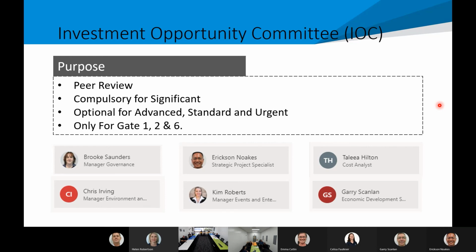I think that's pretty critical. Obviously, we don't want a habit of doing that past that gate, because it would probably mean we haven't done the work properly. But if we accept that potentially in most instances 70% or more of your whole of life costs are in your operating and maintenance costs, then absolutely you should be able to. Yeah.